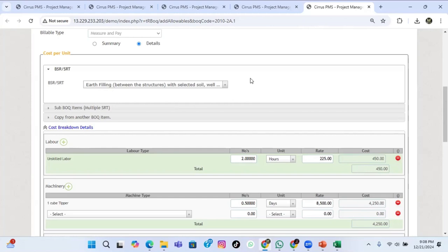Usually, after getting the tender, we are not going to change the tender BOQ, but we will be changing the working BOQ, so that it will reflect the original plan versus working BOQ value. When you go to the actual work, again it will change depending on the site situation.